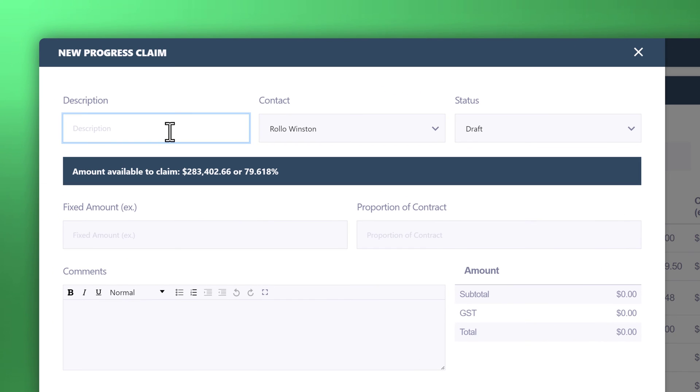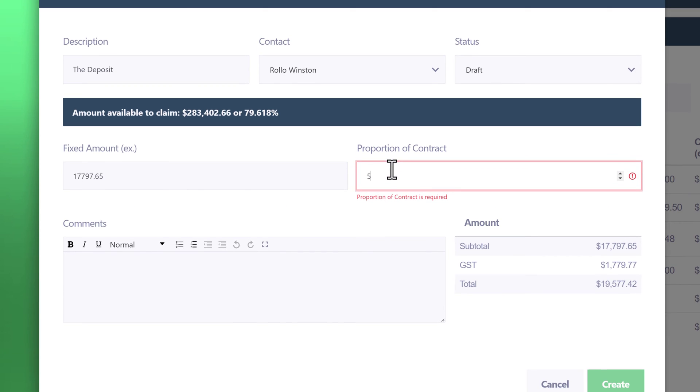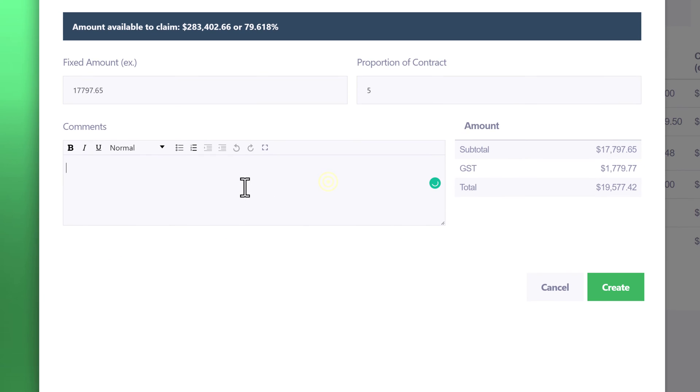All you need to do is enter in the description. In this case we're going to look at doing the milestone method. We'll start off with the first stage which was the deposit. You can enter the fixed amount in dollars, or you can create a percentage for that particular milestone which was 5% as per that document. Create the comment, and once you're done click on create.